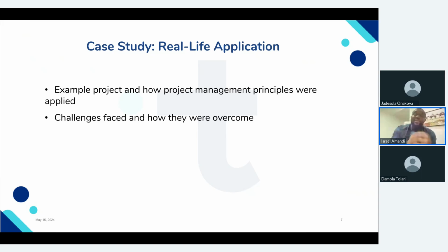We had to migrate from believing that we had to do waterfall into using agile. And most of the tools we used there, I will tell you, we operated a Kanban board, and as well we operated a normal Scrum board, wherein for every sprint, for the development, we had a Scrum board, right? And for the whole overall project, we were actually delivering details on that on a Kanban board.